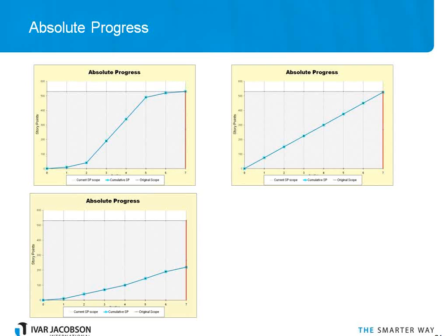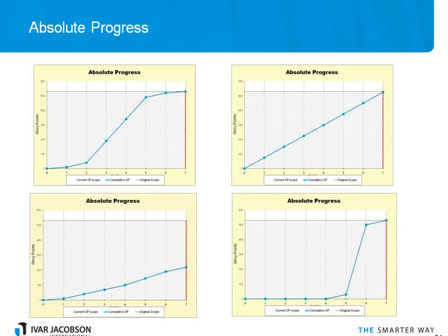So here, this progress is very similar. It's the same as our S-curve, but it never picked up speed. So here, we could extrapolate from the first two. If it's a straight line, we're in trouble. If it's an S-curve, it needs to pick up. So we can look at this and see this, and this will allow us to make decisions. There's lots of decisions we could make if we understood our risk profile, our escape defects, and our progress. We could trade off things like scope against risk, reducing the scope and seeing if we can produce something of value with a lot fewer story points. The final progress graph we've got here is this one.